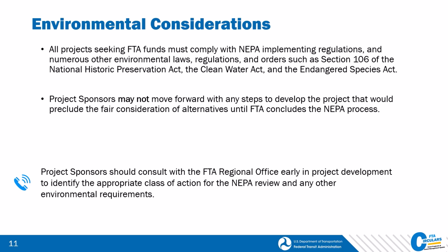Project sponsors may not move forward with any steps to develop the project that would preclude the fair consideration of alternatives until FTA concludes the NEPA process. Project sponsors should consult with their FTA Regional Office early in project development to identify the appropriate class of action for the NEPA review and any other environmental requirements.